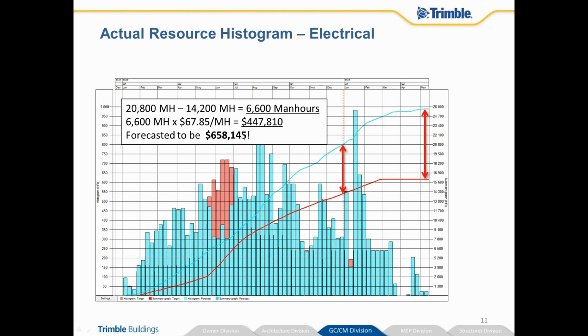We used an RS Means rate here to calculate this, but if you use actual project cost, this has to be paid out. This money is going to be paid out to these workers that are on site. They're expected to be there. They are there. So we're seeing a lot of downtime. We're seeing a lot of waste in these numbers, which ultimately impacted the bottom line of that subcontractor, the general contractor, and the owner. Again, we can see that the impact of the blowfly effect, or flatlining, or demobilizations and remobilizations, all these things come down to dollars and cents, which impact project performance. So why wouldn't we want to use a system that allows us to plan for work to be continuous, so that we can effectively use crews location to location without impacting the variable and the production rate?